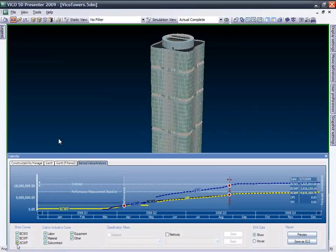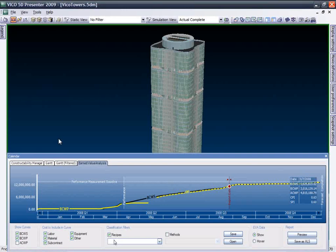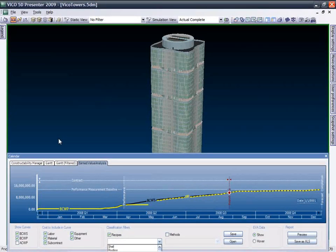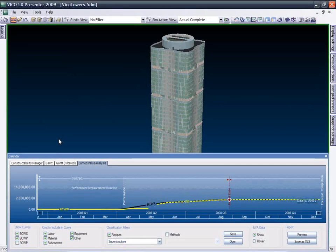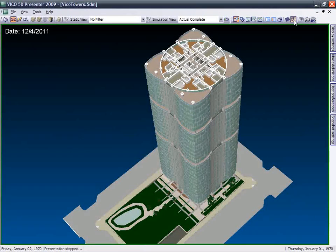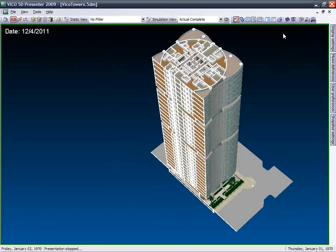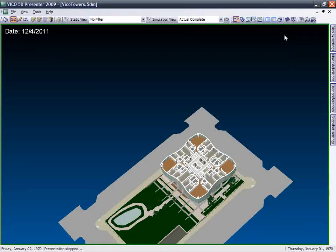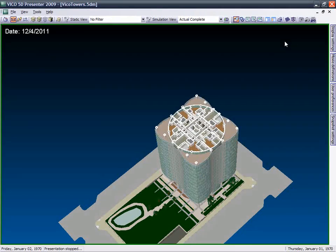The EVA graph can be filtered for better analysis of specific cost items. The forecast part of the EVA graph presents future progress based on the current pace. With 5D Presenter, you can save any view for further discussion and create 5D simulation movies and schedule sequencing.